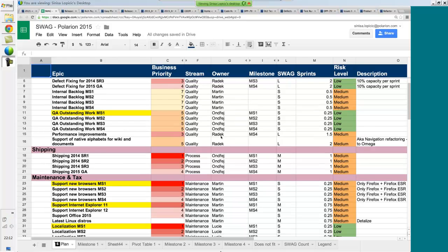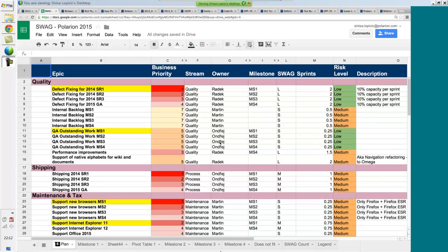What's most important and interesting around this, and why we use it in Excel, is the SWAG document. It actually stands for Serious Survive as Gas, and it's meant to give us some idea of how we can balance work for the year. We don't need to estimate this or make specific promises around deliverables, because it's way too early in the process to even understand the scope of the project. It's used to make some relation and balance around what and how we should be working each milestone. And we do that through the t-shirt sizes.